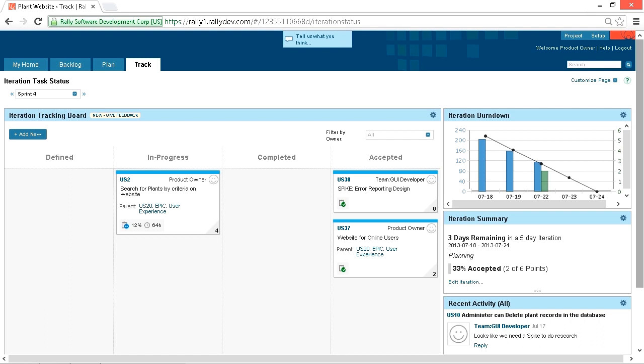So at any point in time, the burn down chart is going to show at a glance the initial amount of work taken on by the team in the sprint planning meeting and the estimated amount of work that's still remaining to complete during the sprint. So the burn down chart is also giving us our velocity of that sprint. This gives the stakeholders an early indication of how well the team is completing the necessary tasks that they need to do during the sprint, and gives them a good indication if they're going to complete them by the end of the sprint.